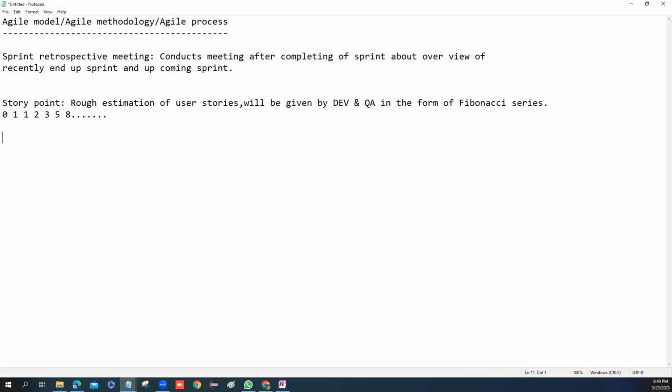All right. And there is another one we call the stand-up call or Scrum meeting, which happens every day. In that meeting, we discuss our blockers. If anything happened yesterday, like we have a blocker or we found some bugs, we can discuss it. We also discuss what we're going to do today, what my plan is. And sometimes we discuss our plan for tomorrow.